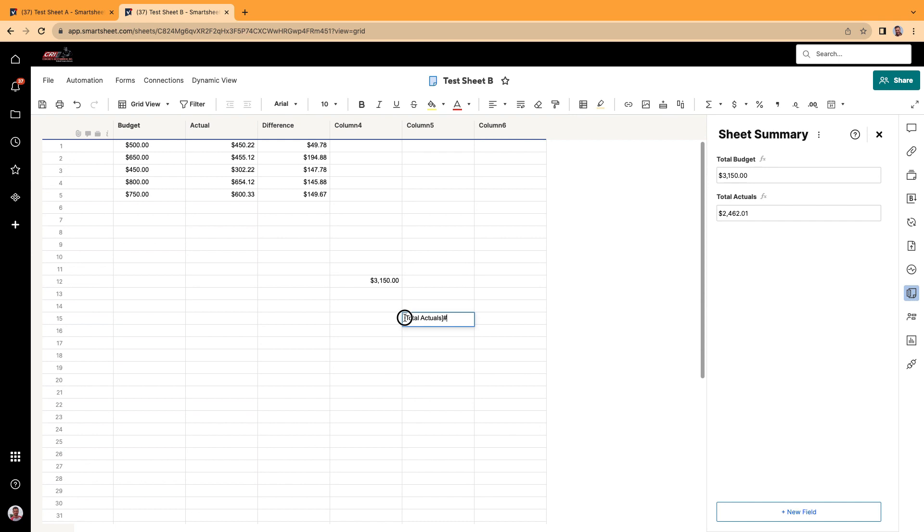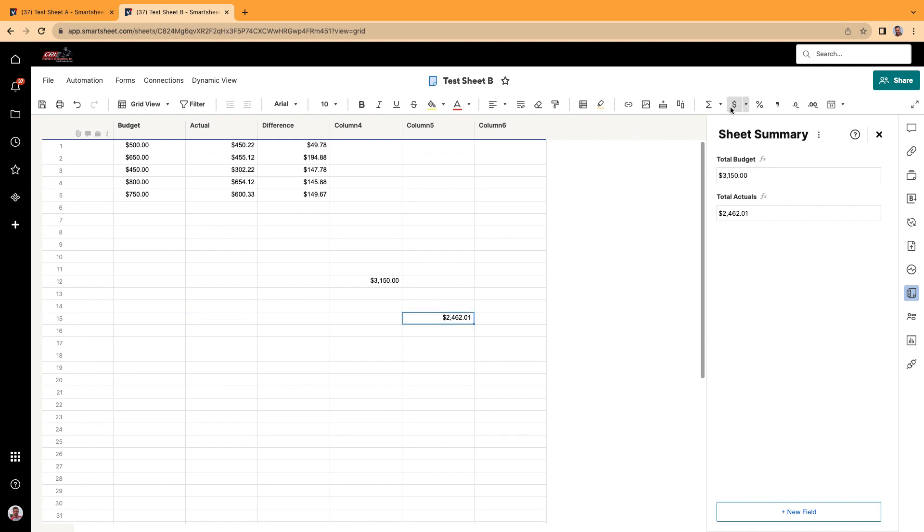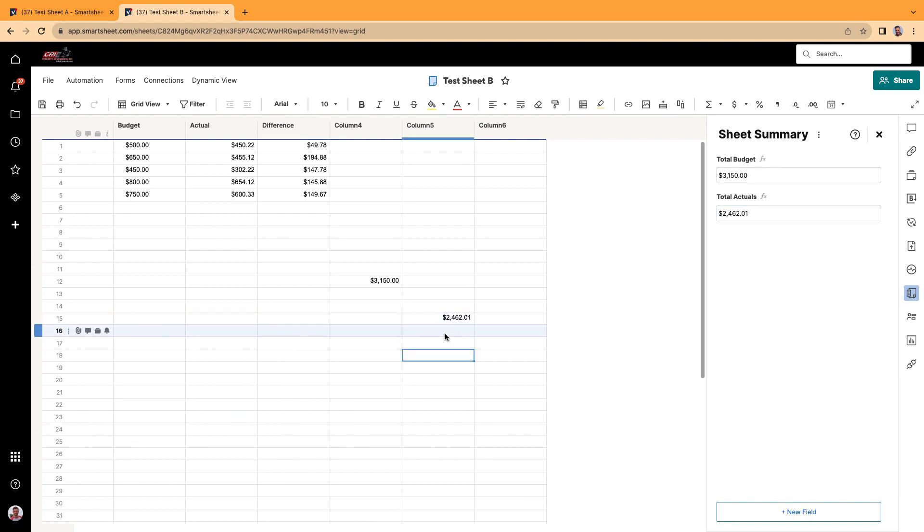I'm going to do an equal sign right here at the very beginning. And look at that. It brings in this number. It's a currency. And again, all I do is I type in the name of the sheet summary cell. Total actuals. Total actuals with the pound symbol after it. And it will bring in that information as well.